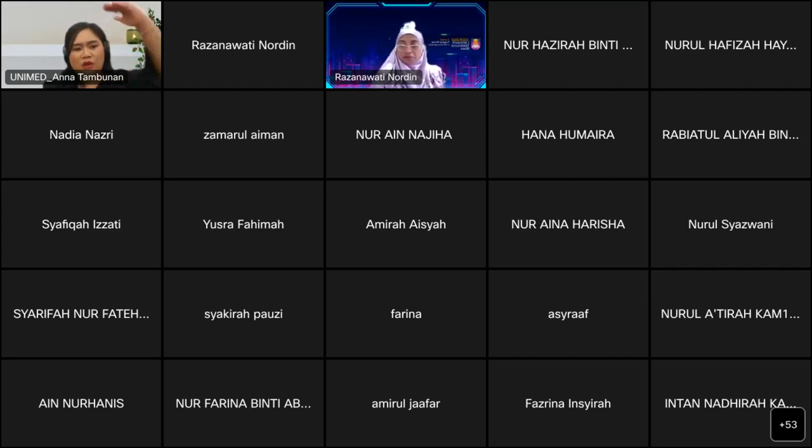So you list all the risks, prioritize them, and then describe what you are going to do to mitigate or take advantage of them, and who on the team is responsible for keeping an eye towards them and resolving them.